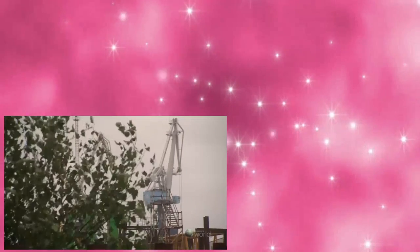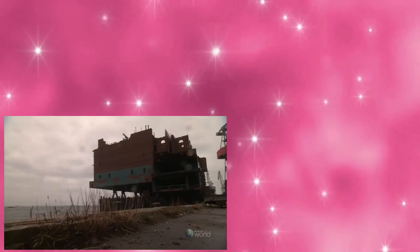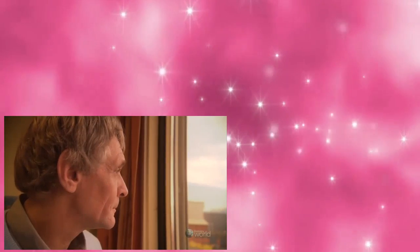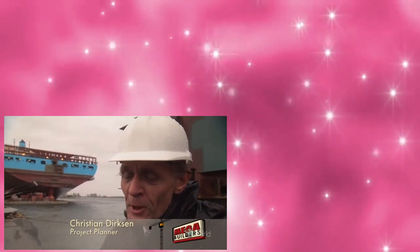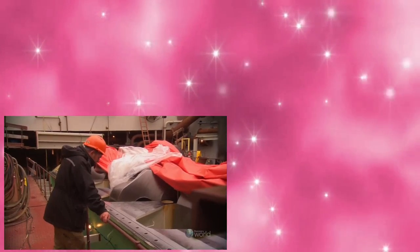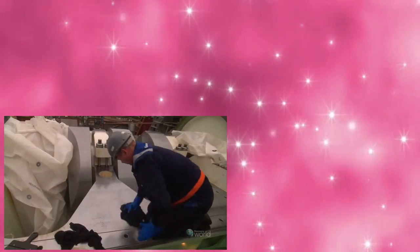A stiff wind overnight delayed a barge from a Baltic shipyard. It makes smaller blocks like this that are then welded here into the big blocks. Now, it won't be ready for the Goliath crane. And if the giant crane is idled, it's a huge setback. You can ask for good weather, but we cannot be sure we'll get it. So therefore, we must have alternative plans, alternative ways to build up the ship. Soren is the answer. Christian moves Soren's next lift, another big piece of the engine, forward.